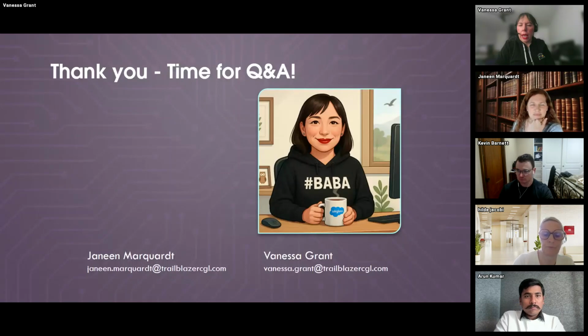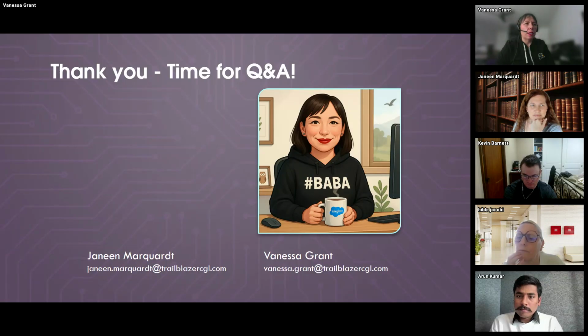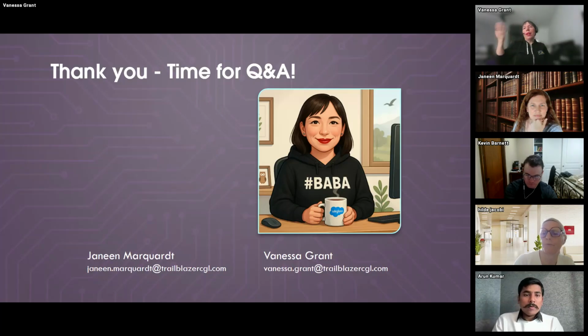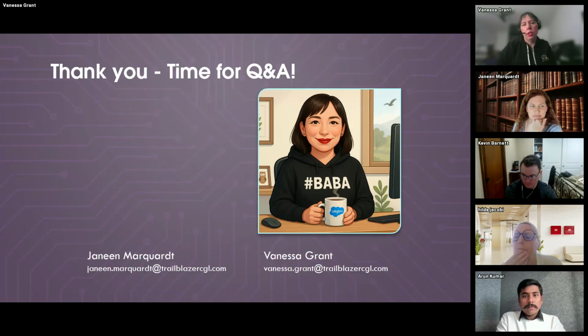What do you do about the "as a" if it applies to multiple personas? I've had that come up. I think that's where you can be creative about it. What I do sometimes, and I think different people manage it differently, is usually pick the highest level persona as the person that wants it, and then in the acceptance criteria, I'll say this should also be available to these other folks. That's generally how I handle it, but I might approach it differently. I think you can be a little bit creative if you've got multiple people that are wanting the same thing.